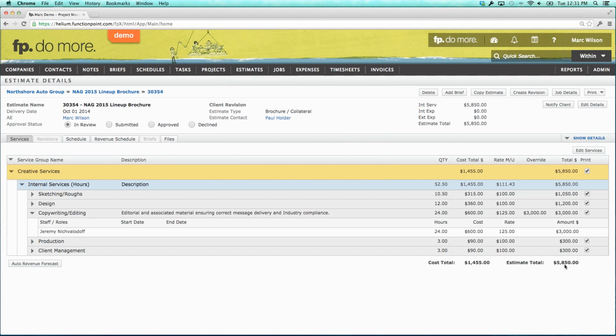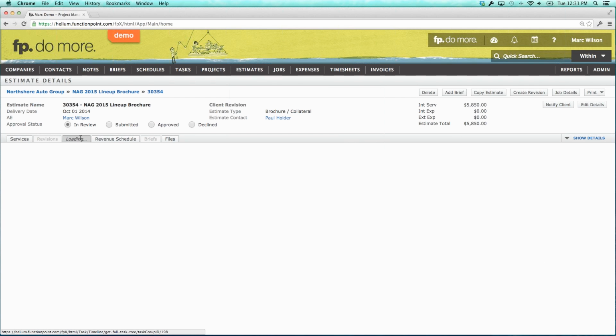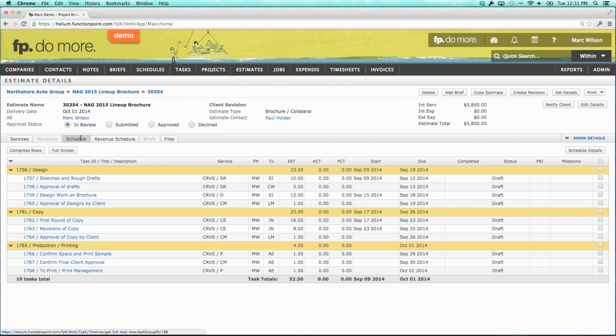Now, for any of you listening who are thinking, well, I don't have staff rates, so this isn't applicable, because my agency has a standard rate so the value wouldn't have changed anyway, there are other aspects of this as well. Maybe you took the schedule from the last job and said, well, we went way over here, maybe we should add another 3 hours to it. And we had a task in the copy round that was completed 5 days overdue, and you'll see that in the original schedule when you examine it. Maybe you bump out the due dates and add a couple extra hours there.